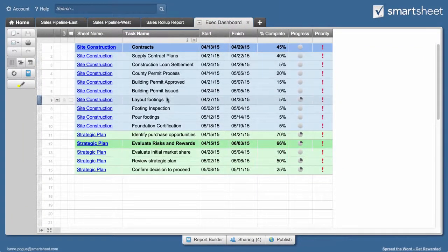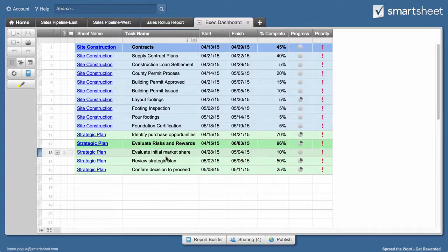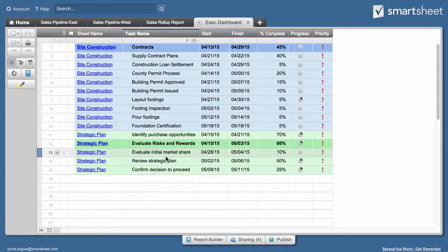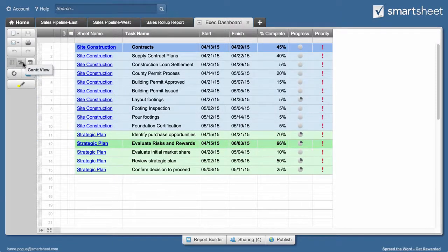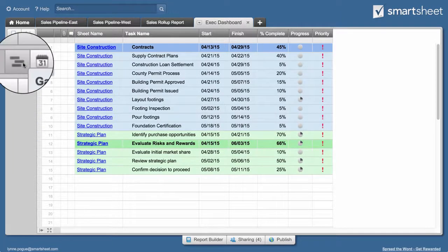The report lists all the tasks that need to be completed. To make it easy for people viewing the report to visualize how long each task takes and how the tasks relate to each other, Kelly adds a Gantt timeline to the report.